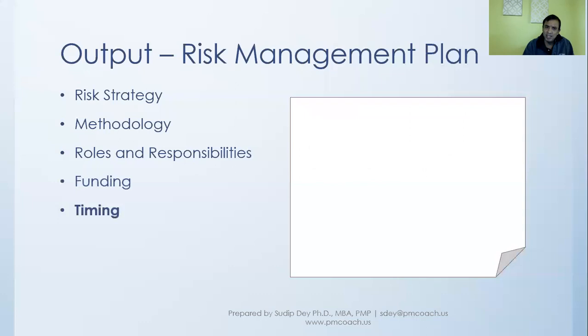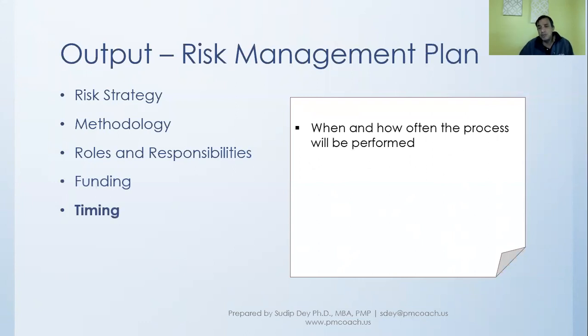Then the timing: when and how often the processes will be performed. For example, how often will we do the risk identification? How often will we be doing the qualitative risk analysis? This is something that we'll put together in the risk management plan.